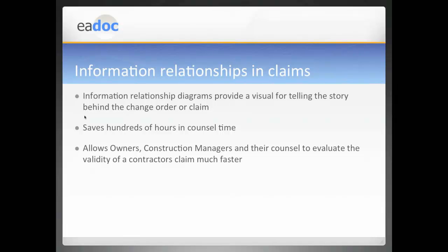At the CMAA conference in Chicago, they did an analysis where they figured out that if their law firms had to go through 60 gigs of data, it cost $4 million just going through that data because it was not organized and structured. In a more structured format, that cost reduced to about $600,000. So to go from $4 million to $600,000 in legal costs is quite substantial, comparing a very structured and organized project management system with a job where they had done nothing but emails and hard drives for storing that data.